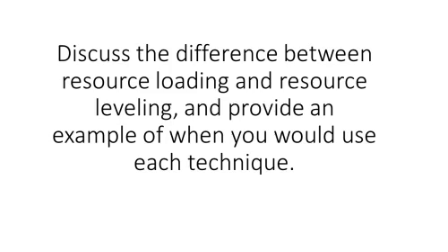Resource smoothing is more to do with desired limits. Like we have 45 hours available for a given resource, but we wish to allocate 38 hours per week so that we have some breathing space. The desired limit identified in resource smoothing may not be applied in some cases if we don't have slack. We apply resource smoothing after applying resource leveling. For example, to manage human resources, both techniques are required.